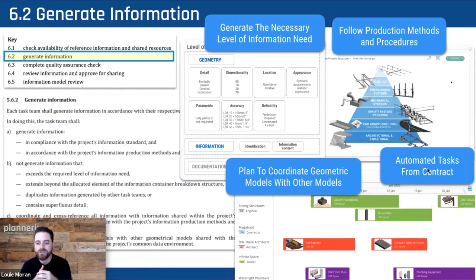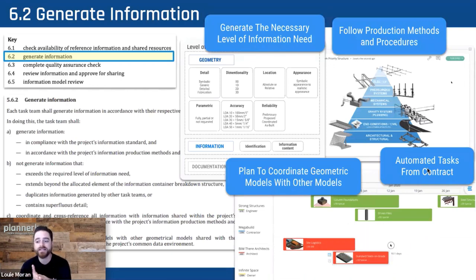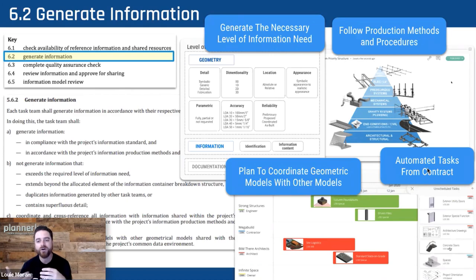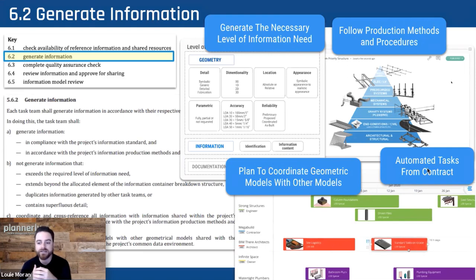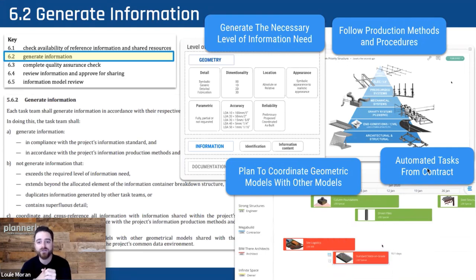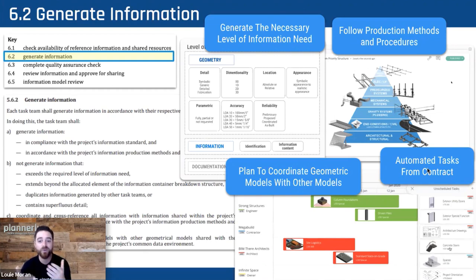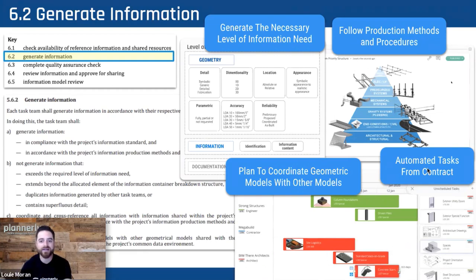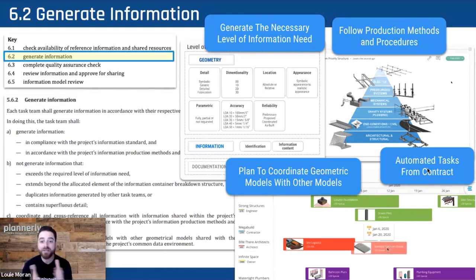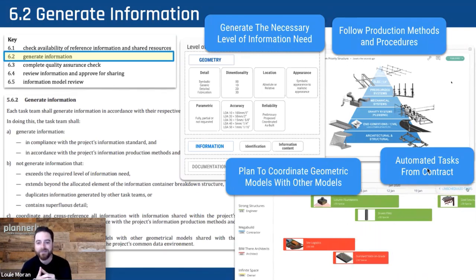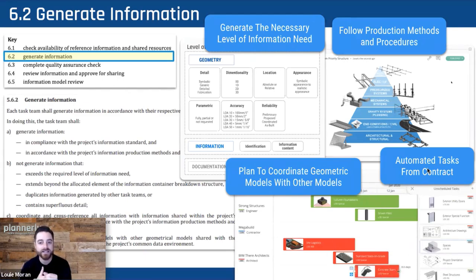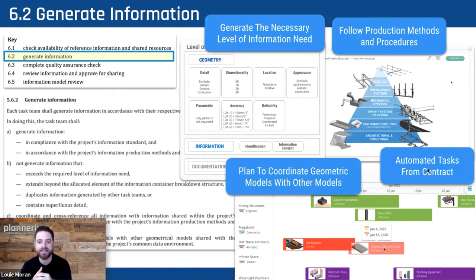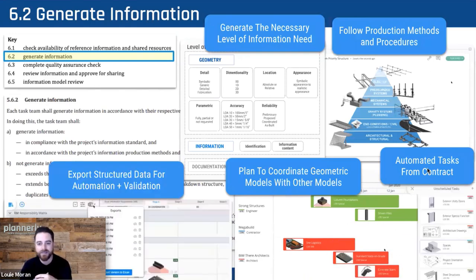We need to understand when we're going to be producing the information. This is simplified inside of Plannerly because all of the contract requirements you see on a panel on the right-hand side can simply be dragged and dropped into the timeline, with durations and even dependencies so we can inform others when we need certain deliverables. Having the right procedures will distribute the work — a system priority structure helps mechanical and electrical coordinate a clash together. Teams waited until coordination day to have someone come in as a referee, but with a system priority structure you can look at a clash yourself and make that decision, being proactive instead of reactive.